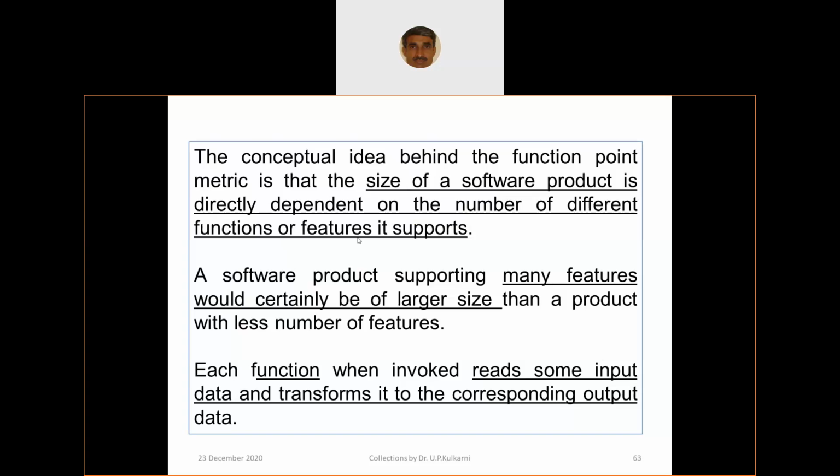Now for this backup feature, I know how much effort is required because of my earlier experience. So I look into these features, and feature-wise I try to classify the feature, classify the project, based on my historical experience. I can attach to this feature this many man hours required.